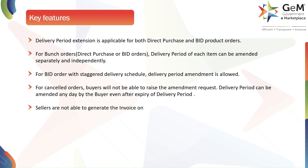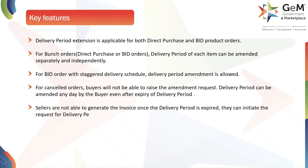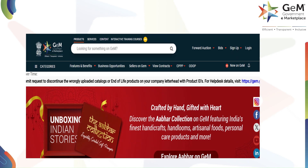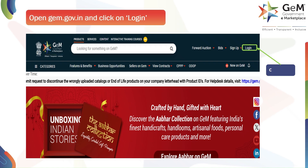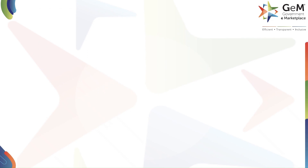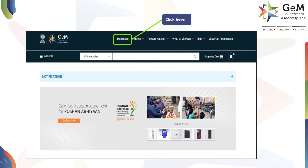Delivery period can be amended any day by the buyer, even after expiry of the delivery period. Sellers are not able to generate the invoice once the delivery period is expired; they can initiate the request for delivery period extension in order to generate the invoice. To begin, open the website gem.gov.in and click on login. This will take you to the login page where you can enter your details. After logging in, click here to go to the dashboard.